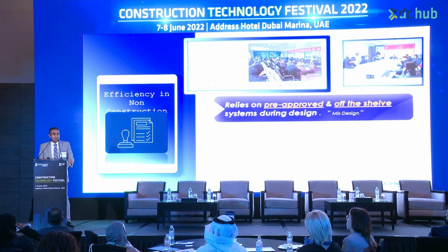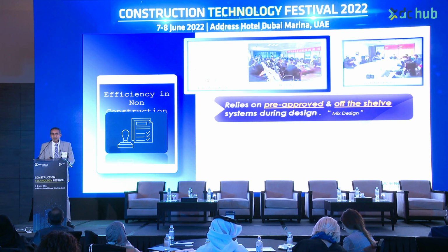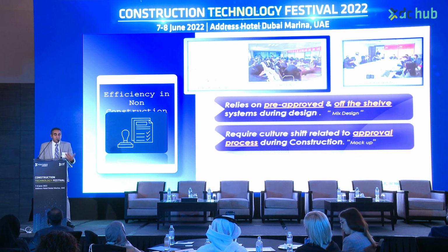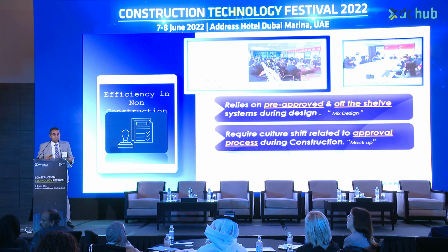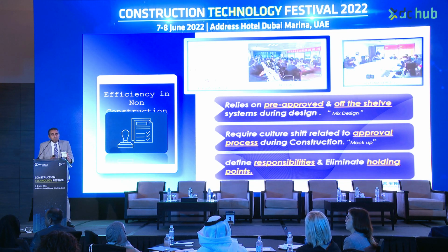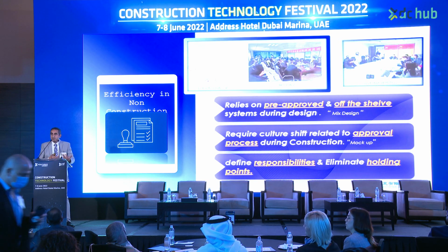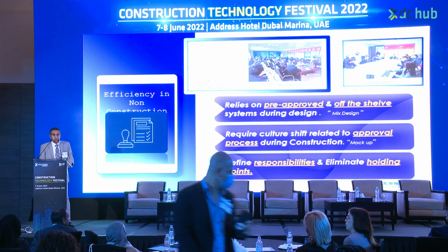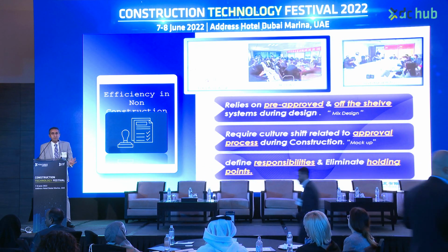In many countries, this concept of shop drawing approval is not there. In many other countries, even nearby countries, the authority review for the design drawing also is not there. So this is something we need to look into. We also need to consider this approval process, and sometimes we don't know what we are waiting for. For example, we use the mock-up in many cases to confirm and validate the design, for material selection and for colors. Mock-up is only for workmanship.